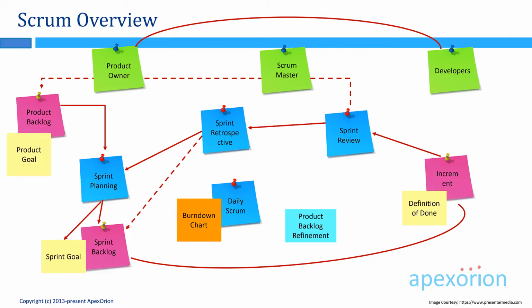If you notice, right after sprint retrospective is the sprint planning for the next sprint. And product backlog is an input to sprint planning, which means the product backlog should be ready at that time. And in order to keep the product backlog ready, the team invests time during the sprint to refine the product backlog.